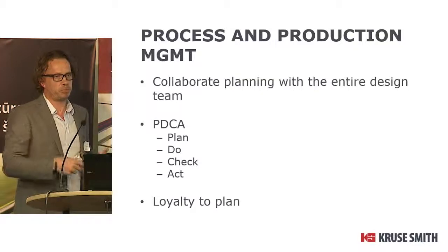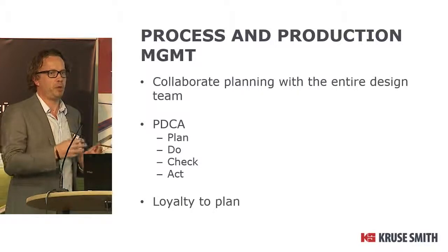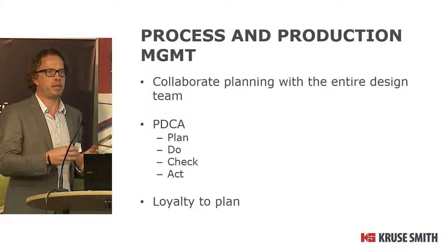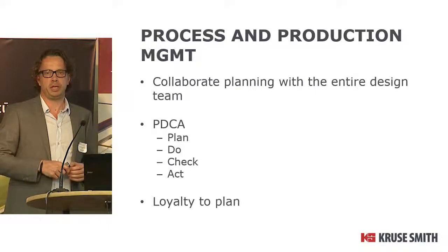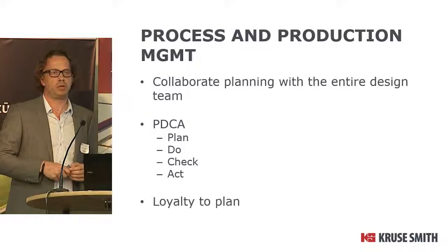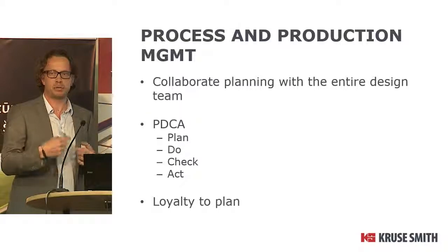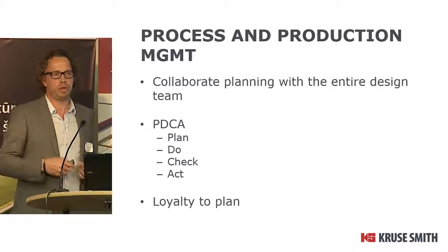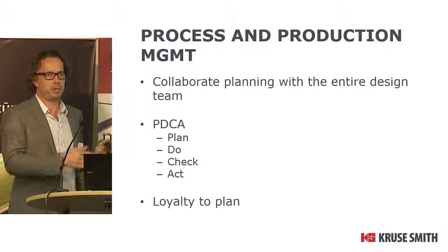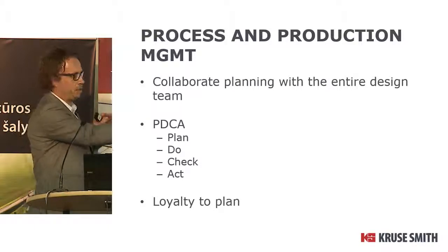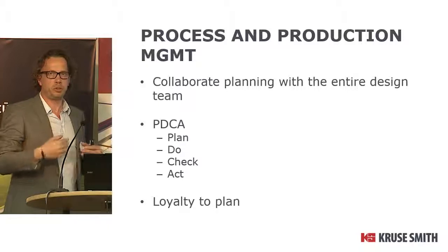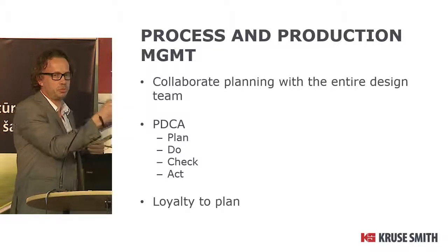The first phase of the project was very difficult to get them to plan, because nobody was really used to that. People paid attention to what the architect meant about when they should design things. The structural engineer didn't believe in it because they were not used to people caring about their design process. But once they understood that we really took them seriously, we said, okay, the design period can go this long. If you want to use the early stage this long and the detail phase this long, you can, but you can't move the end date. You can pretty much use the time from start to finish as long as you lock the finish time.